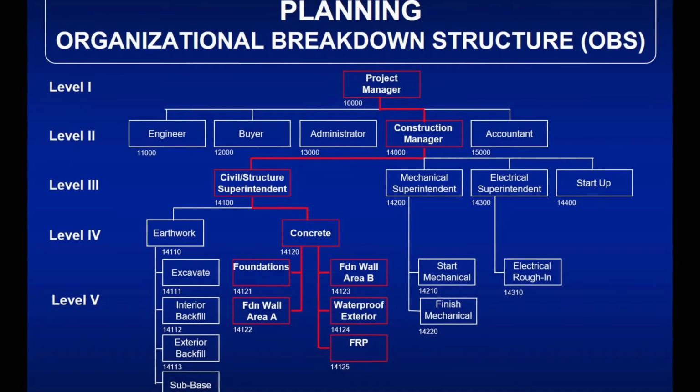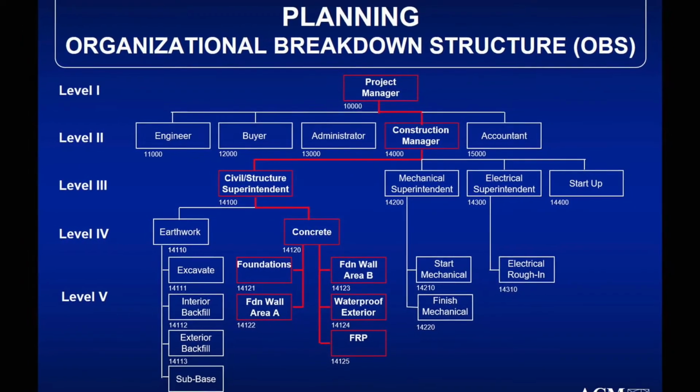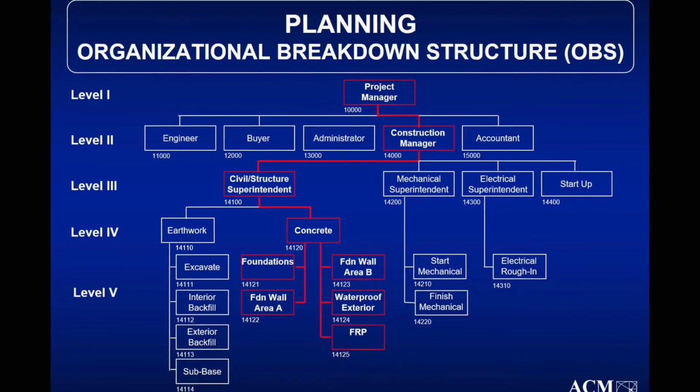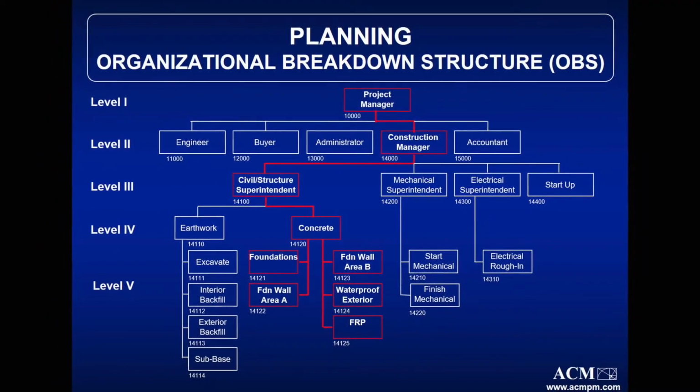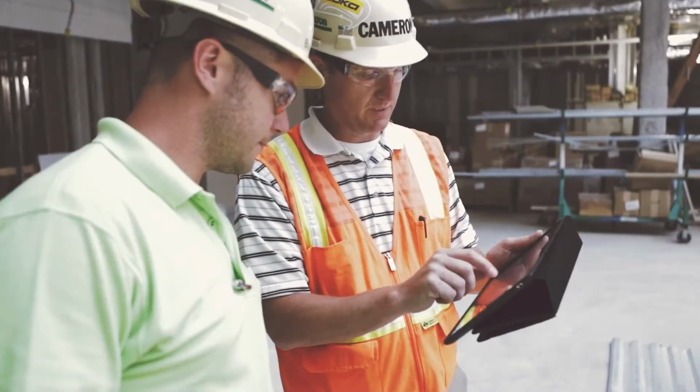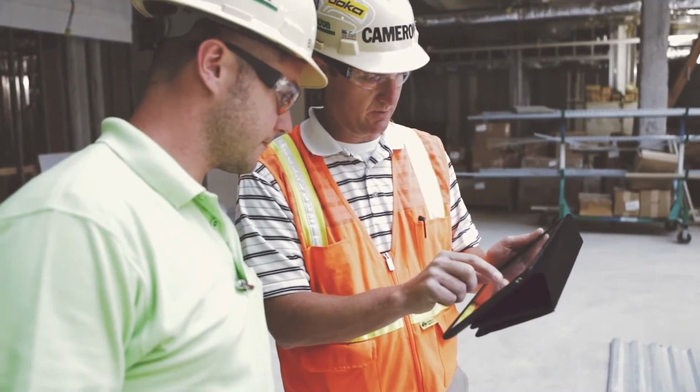If you are separating by discipline, you are focusing on how it can be assigned to the OBS instead of focusing on the scope and breakdown first. It shouldn't be about the type of work this person can do, but rather what needs to be delivered to satisfy the requirements on a project.